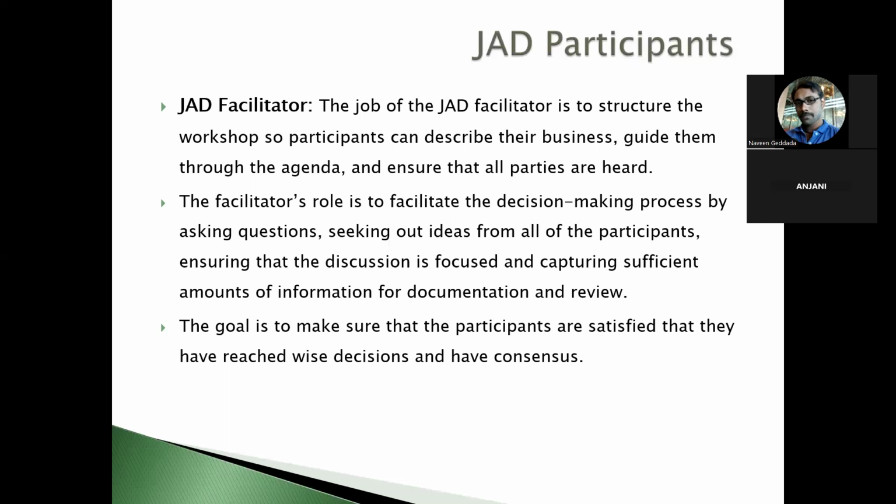Once we are done with the workshops, we will send these notes to all the team members, saying these are the points that we have discussed, or these are the confirmations that we need. And we point out the responsible persons who are going to get the confirmations or provide clarity on these particular requirements by our next workshop or session.